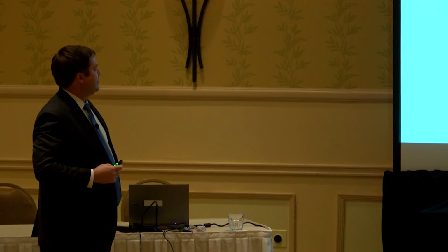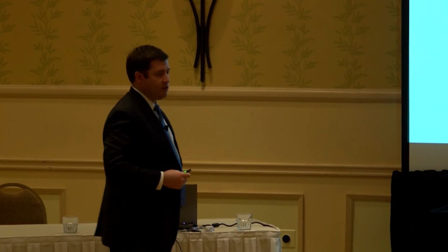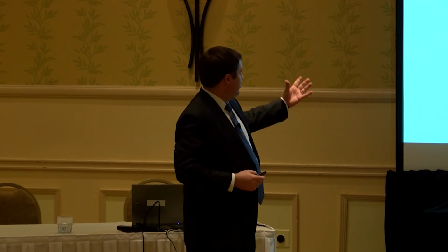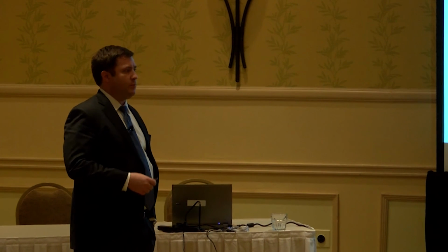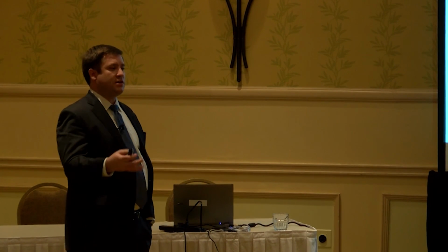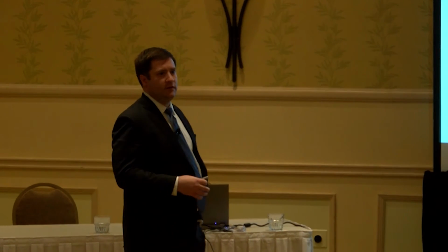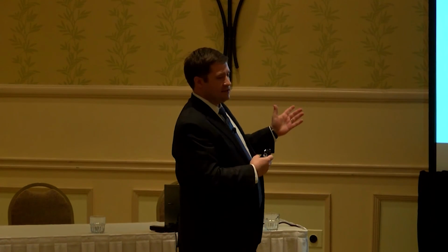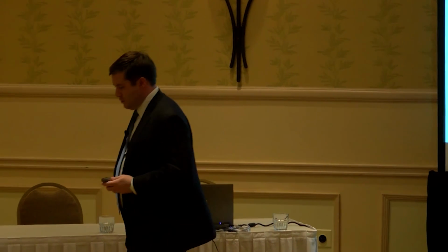With the P3 document series, you would have an owner who would typically have a contract with what they were going to call a public-private partnership. And then that public-private partnership would typically, for the construction and design portion of the project, serve as the owner in the design build series that we talked about. So the owner would have a contract with the public-private partnership, and then the public-private partnership would have a design build agreement with a design builder, and then even going further down like we were talking about before, the engineer could then be contracted to the design builder.